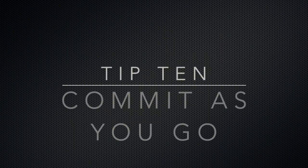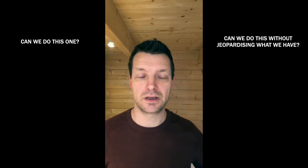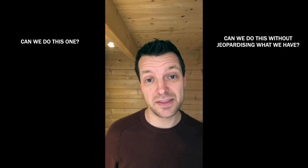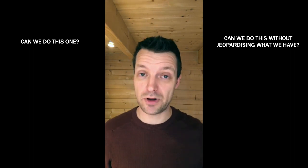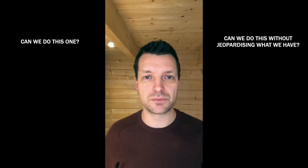And my final tip, tip 10, is commit as you go, not a big bang commitment at the end of sprint planning. Every time you're considering a story or a feature as a team, think, okay, can we commit to that? If we can, brilliant. Put it in the box. Next story, can we commit to that without jeopardizing our current commitment? If the answer is yes, brilliant, add it into the pot. Next one, can we commit to that without jeopardizing the previous commitment? No, okay, so do we need to break that down? Do we need to go for something smaller?